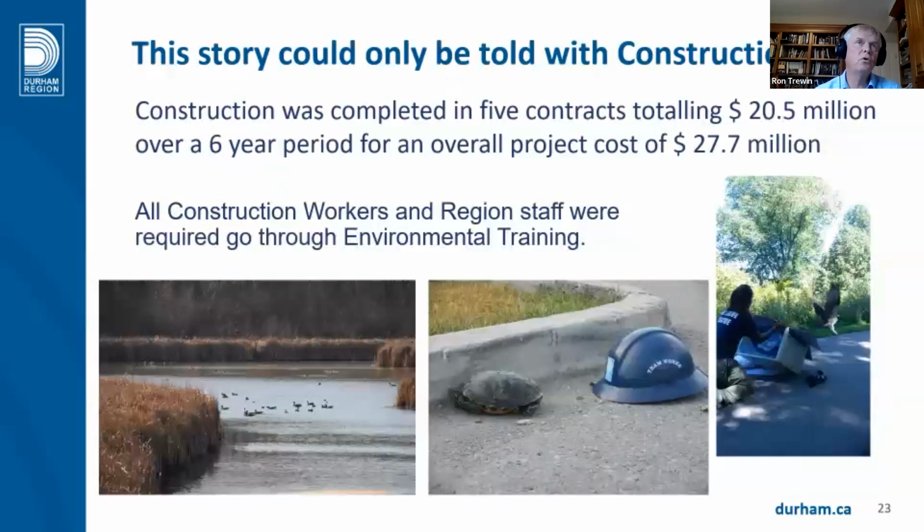Of course, this project could only be told with construction. Construction was completed in 5 contracts, totaling 20.5 million over a 6-year period for an overall project cost of 27.7 million. All construction workers and staff were required to go through environmental training. Training was by our environmental consultant, Rudy Wormy, the BTE.